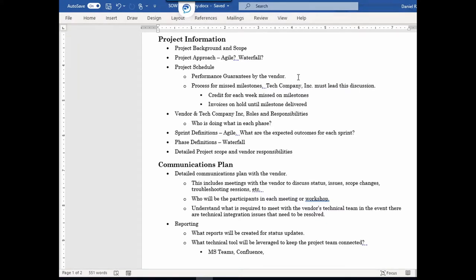With the vendor looking at your project plan and agreeing they'll deliver on that timeline — what guarantees can they provide you? You need to get that in writing. For example, if you're working on an Agile project and their internal velocity of the software developers is not up to par, how can they guarantee they're going to execute a certain amount of stories for each sprint? That's just a quick example, but you have to get guarantees from the vendor.